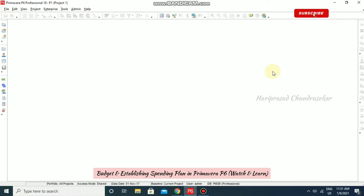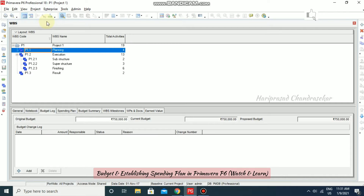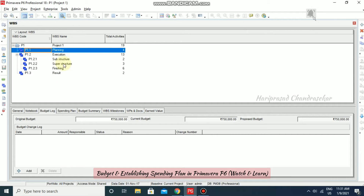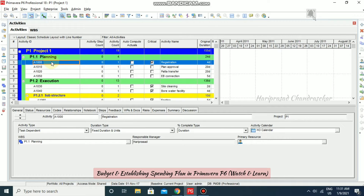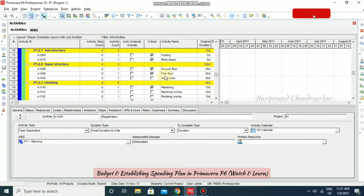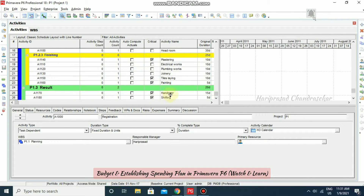In Primavera, we will see how to add a budget to our projects. For that, I am going to the project WBS. I already created a WBS with Planning, Execution, and Result. In Execution, I also have Substructure, Superstructure, and Finishing. I also added some activities to this WBS.